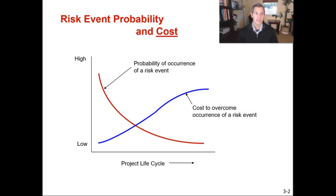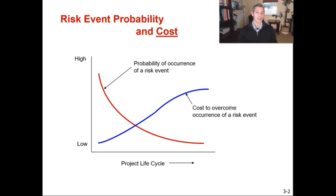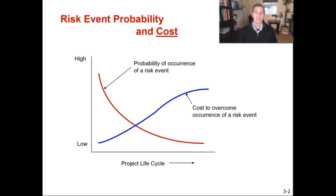For risk event probability and cost, the blue line is cost and the red line is probability. We want to catch errors in our project early. We're more likely to catch errors early in the project versus late, and if we do catch those errors early it's not going to cost us much to correct them. But if we're already halfway through a construction project and we realize something is wrong way back at the start, it's going to cost us more later in the product lifecycle or construction cycle to overcome the occurrence of that risk event.